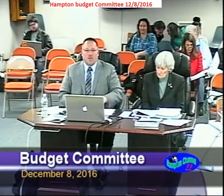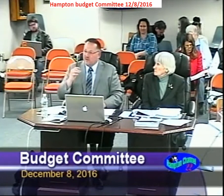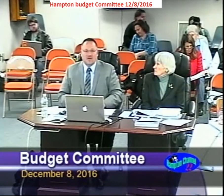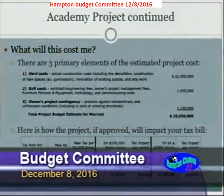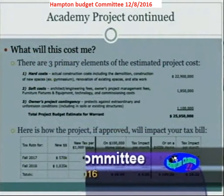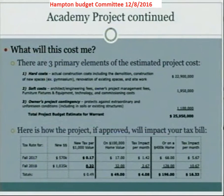The costs that they have brought forward, $25,950,000, are broken down into three elements: hard costs, soft costs, and contingency. The hard cost, $22,900,000, is up from $21,895,000 last year. That's about a 4.5% increase, and that's the only increase that we've seen in the budget. And that's really driven by the mechanicals we've been talking about, because the trades simply haven't recovered since 2008 and the economic downturn.